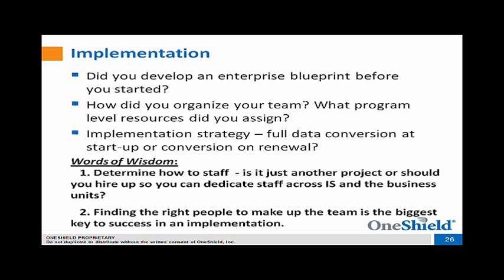So that's the approach we took. Looking at our future lines, we're probably going to go more for non-renewal. But again, going back to what I mentioned earlier about the coexistence, especially the big bang conversion helps with the coexistence. Anything you'd like to add around data conversion? I think there are a lot of viable strategies, both on renewal and Big Bang, and it really depends on your business mix and which core system you're replacing.